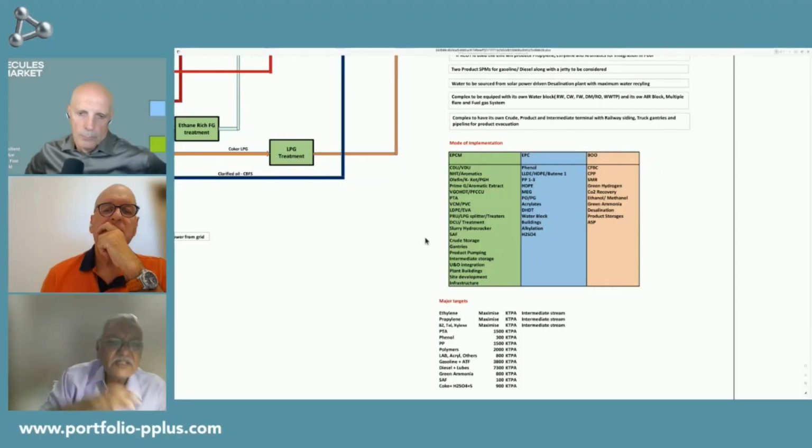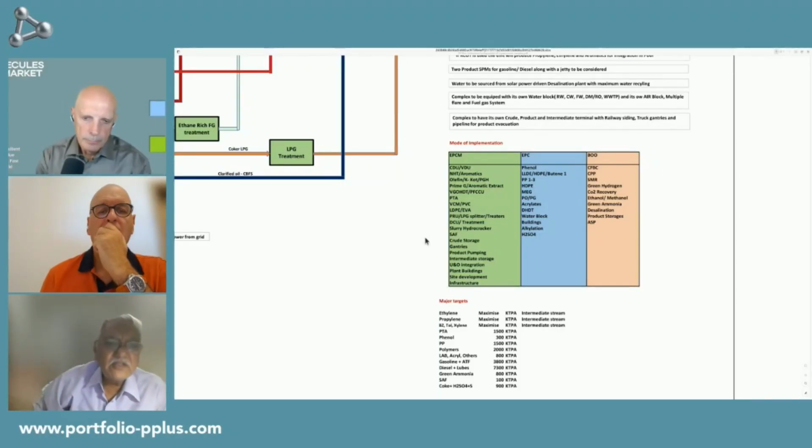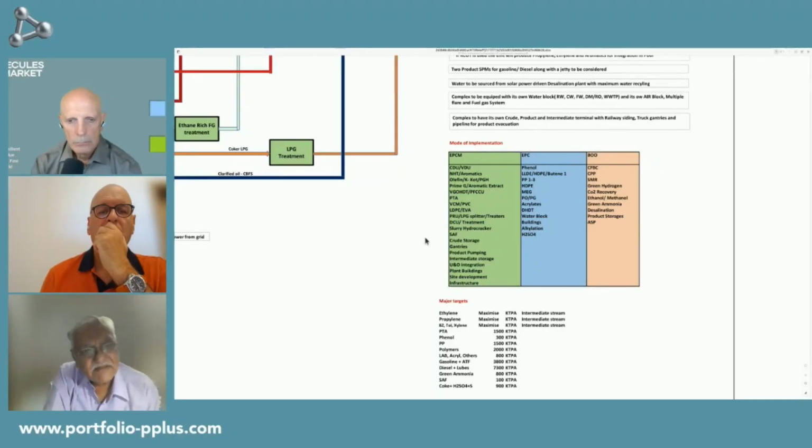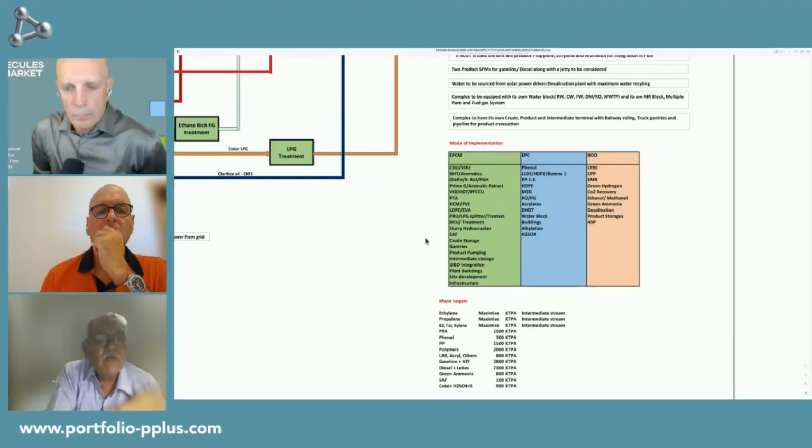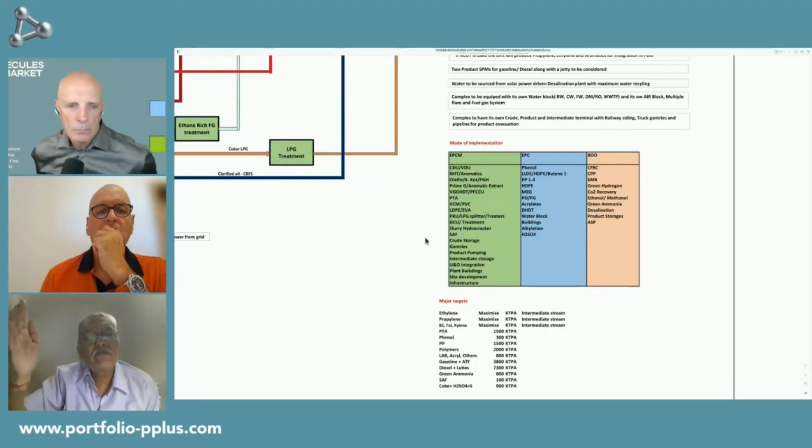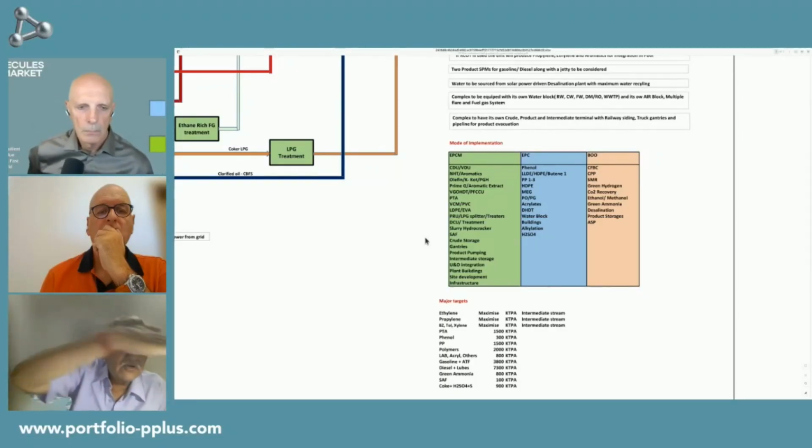So our intention is that, let's say if there is a 48-month project cycle, then we will ensure that at least 40 to 42 months is allocated toward construction. And while engineering may be 24 to 28 months, so there is a lot of overlap.